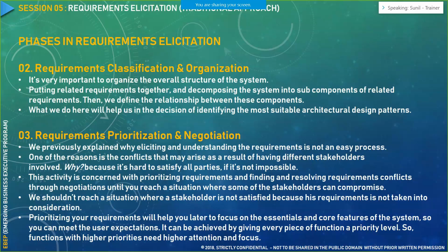Now there is something called functional decomposition when it comes to writing the requirement. It means you have a high-level functionality, like the requirement to build an HR management system. That is our high-level functionality. Now we drill down that requirement into 10 to 12 steps. So what we essentially did was decompose the system to have better visibility around what is needed.